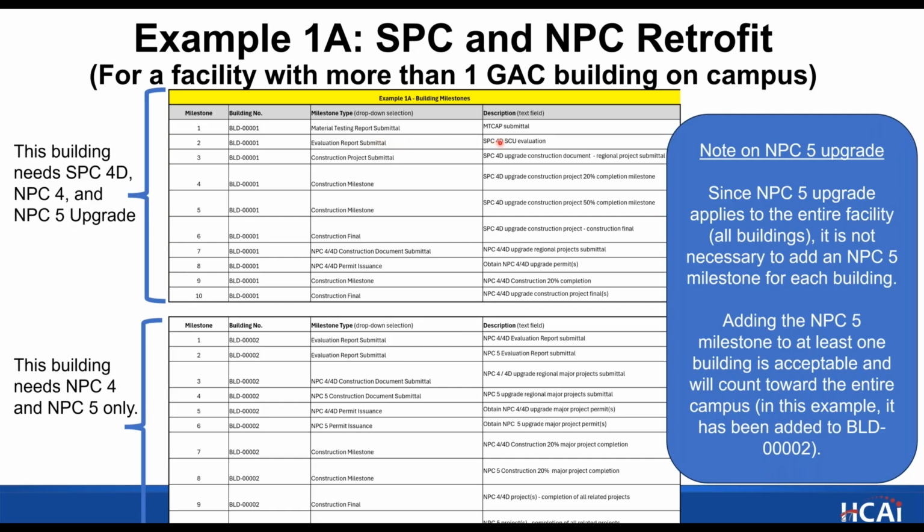SPC4D evaluation that comes to the Seismic Compliance Unit. For these, you would put your dates next to it in the ESP when you're actually filling out the application. So maybe when you are figuring out which milestones to use and you download our template, maybe you add a couple of columns on the right to put in your date and whether you're going to use that as a critical milestone. And the date you would use, for example, for this SPC4D is the date you're planning to submit that evaluation to us.